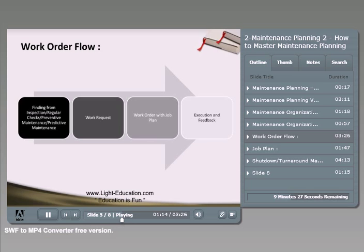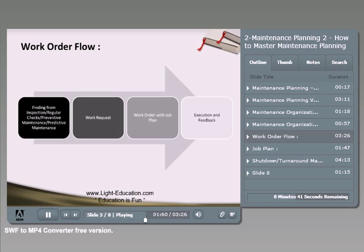Once inspection findings are recorded, people create work requests that are directed to the maintenance planner, who performs the actual planning. Planning means assigning the proper materials needed for replacement or repair, the needed manpower, the estimated duration, what tools are required, and what mobile equipment or special tools are needed — making everything ready for the execution team so no time is wasted.